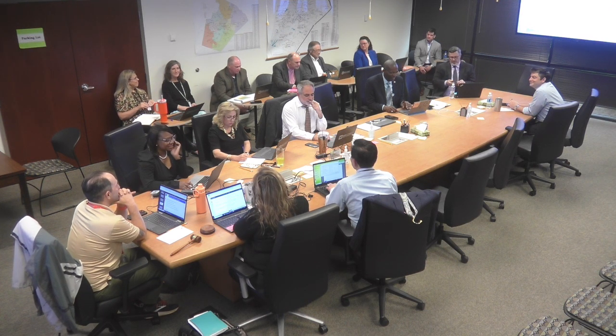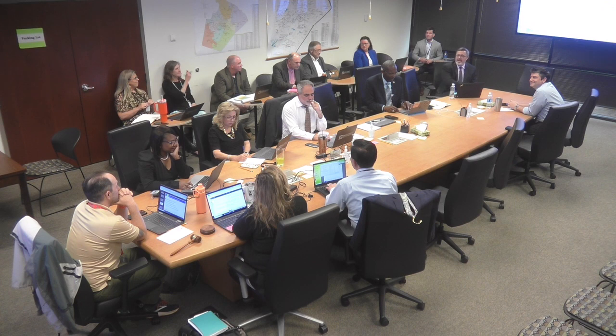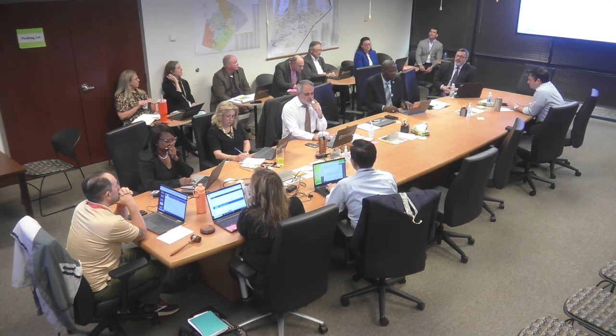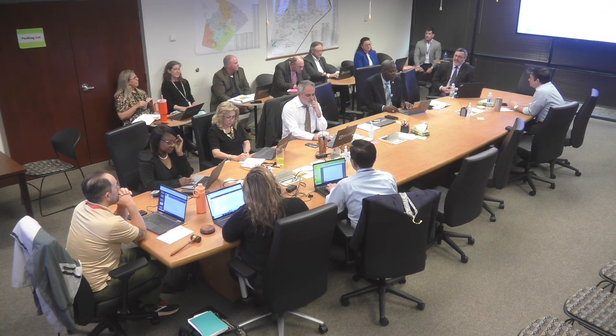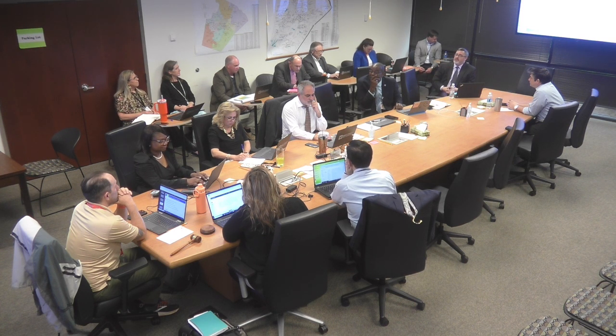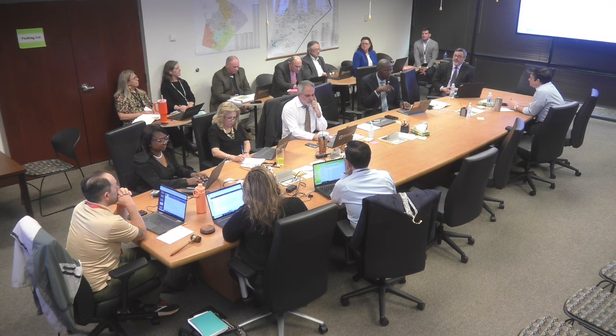All right, so you had asked us to look at a 25-year plan. And so staff feels like the work that we're doing right now, right? I shared the numbers with you. We were able to move 110 classrooms in the last 6 years. If we continue at that pace, we think we can reduce the number of trailers on our campuses by 50%. Now, again, this is going by the actual number of units, over 600 units. So if we continue to do that, you're looking at an average of, what is it, 12 a year? Yeah. Over the next several years.